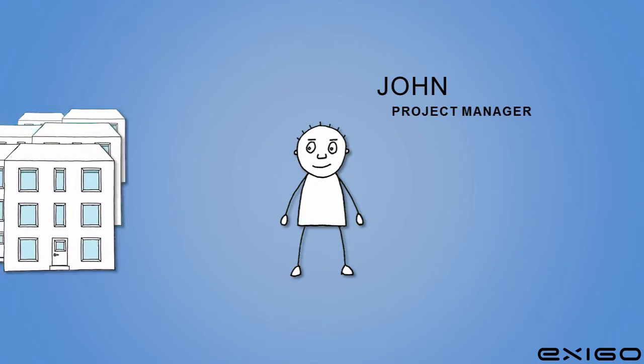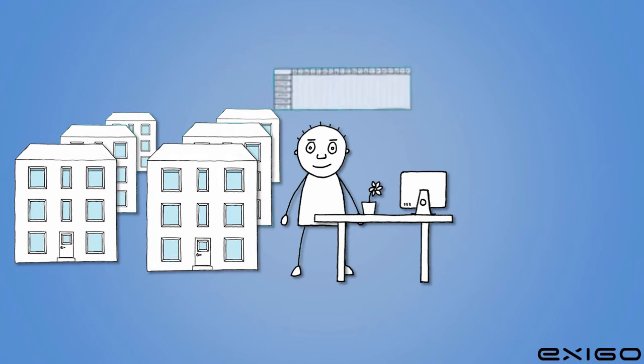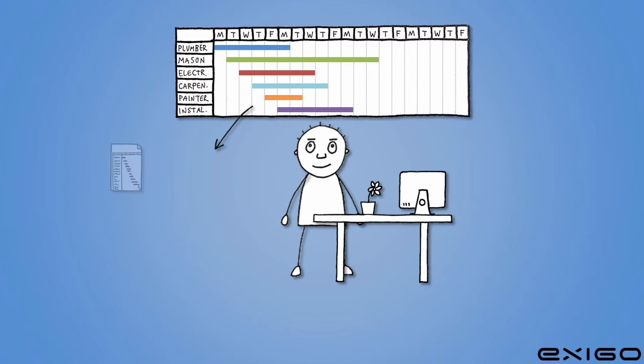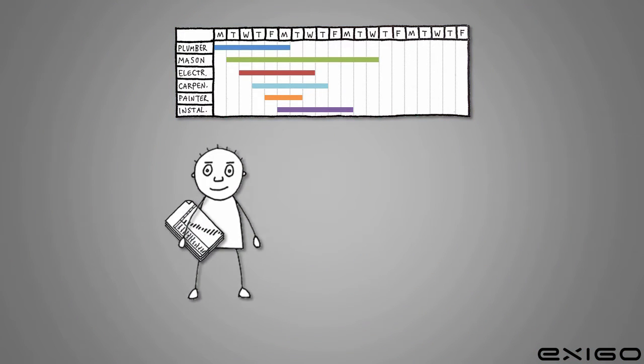This is John. He is the manager of a project renovating six blocks. He knows how important it is to have a good schedule in order to meet his deadline, so he validates expected durations with each trade contractor. John prints out the entire plan, which is pretty long, over many pages, but he puts on a brave face and starts the project.